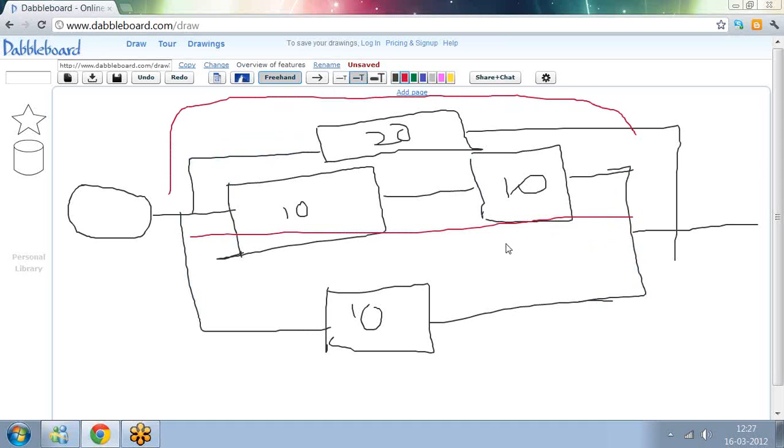So technically, a project can have multiple critical paths. If a project has multiple critical paths, then it is slightly difficult to manage because you'll have to track multiple paths. Otherwise, the project will slip.